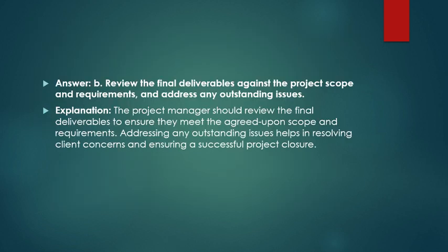Answer is review the final deliverables against the project scope and requirements and address any outstanding issues. The project manager should review the final deliverables to ensure they meet the agreed upon scope and requirements. Addressing any outstanding issues helps in resolving client concerns and ensuring a successful project closure.